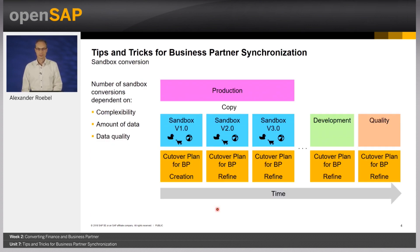Why do we recommend going for tests with separate sandboxes? Sandbox conversions are there to reduce potential errors in the productive system. Furthermore, we need indications for the technical runtime for the business partner synchronization — this is to schedule and refine the productive cutover. As I already mentioned, we recommend a business downtime. The target is to keep this downtime as short as possible, but as long as required.